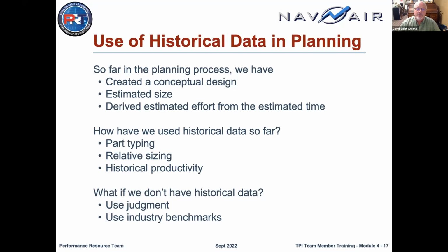So I mentioned earlier that we use this for development of a database. It was very difficult. None of the developers had actually done that work before. And when we searched high and low on the internet for industry benchmarks, we found there weren't any. Either they hadn't been recorded and published, or they just hadn't been collected. So this is the case where you plan early and you plan often. They replanned on a monthly basis, and over the course of a 6-month project, even though they had to use their judgment and had no historical data, they were still able to deliver the database within 1 day of their